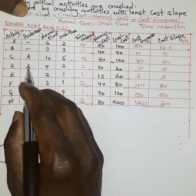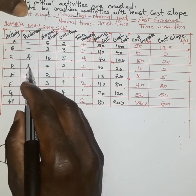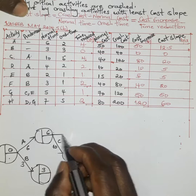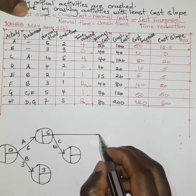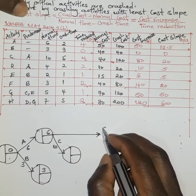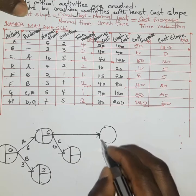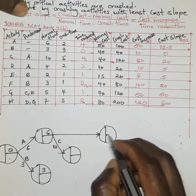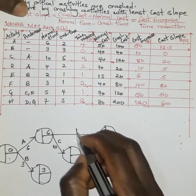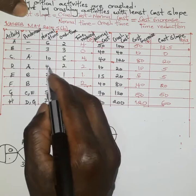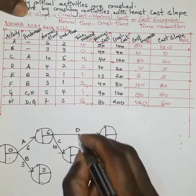Activity D also begins as soon as activity A ends, taking a duration of four weeks.